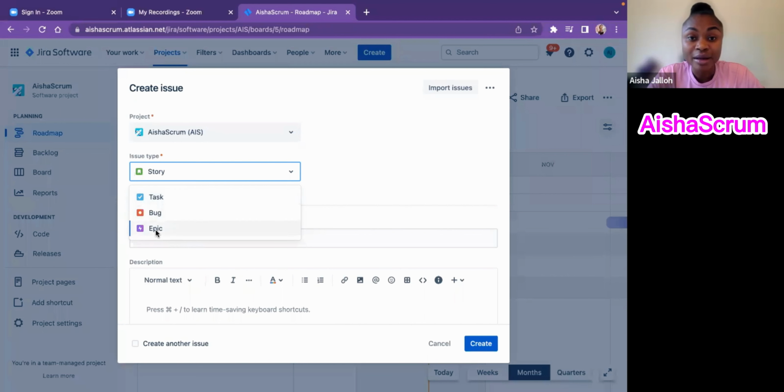I'll always start with epic because the hierarchy always starts with the theme, or maybe the initiative, and epic, features, story, tags, and subtags. But in this case, JIRA sees epic and feature. For ADO, they see feature and epic as the same level. But here I'm going to be looking at epic, which is the bigger chunk of work, which we will always split down into multiple stories. So at team level, we're working at story, even though it's always going to be related to an epic.